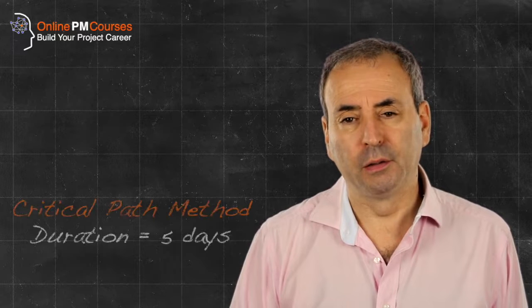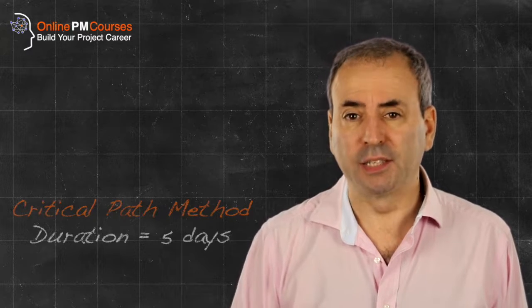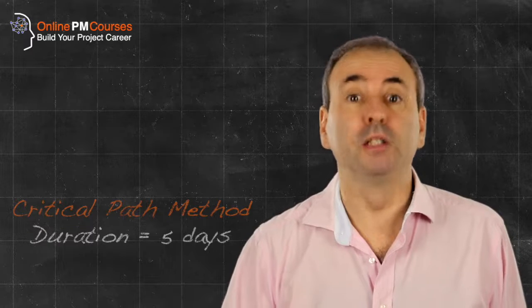The answer is yes, because the second difference is of much more substance. The critical path method uses a much simpler single point estimate for the duration of an activity. You estimate how long the activity is going to take and that's the number that goes into the model.